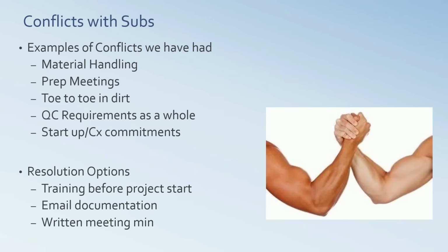You're going to see conflicts over prep meetings, especially on federal projects. If there's turnover of leads, lead foremen, leads on crews, and they feel like the crew is no longer adhering to contract and/or safety, right? If you have an incident, then you're going to have to re-prep. So subs need to understand up front that if there's going to be turnover of their lead people, they're probably going to have to have another prep meeting. And that's been a conflict.